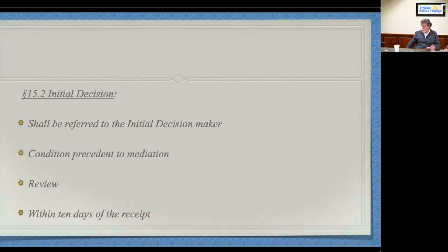What if the timeframes are different? It might say under your subcontract 21 days on your timely. The GC contract might say 7 days. So you give it to the GC on the 14th day, they are already too late. So there is an effort that, in my opinion, a well-managed team will have to communicate about these issues.